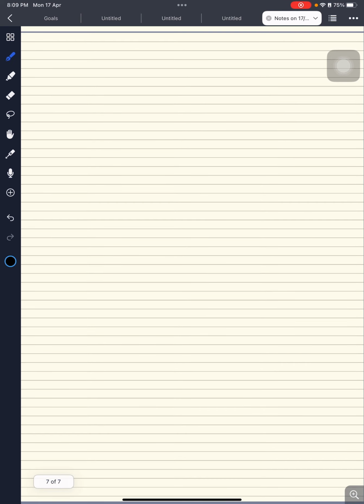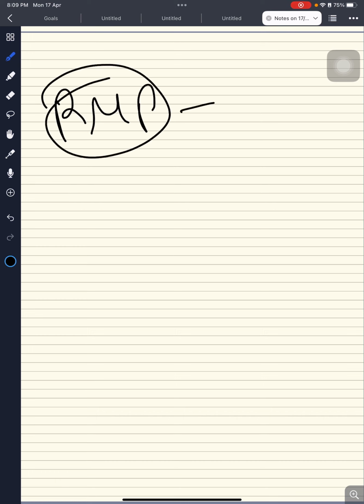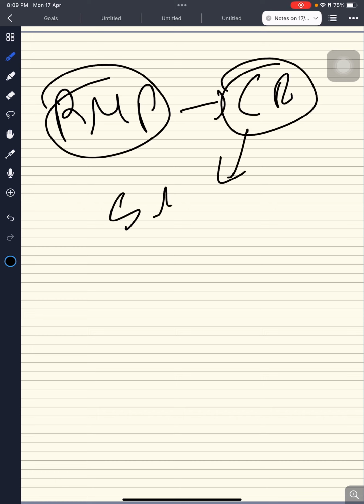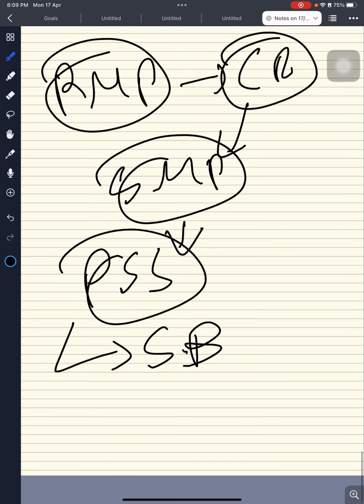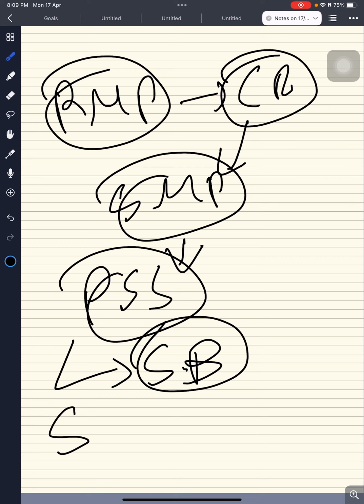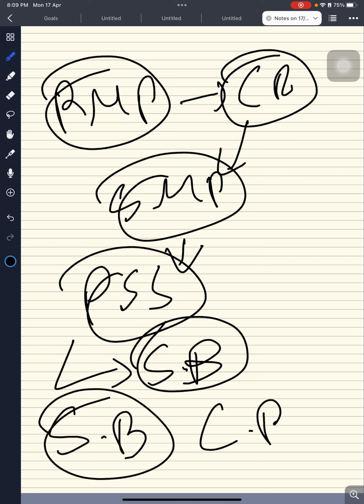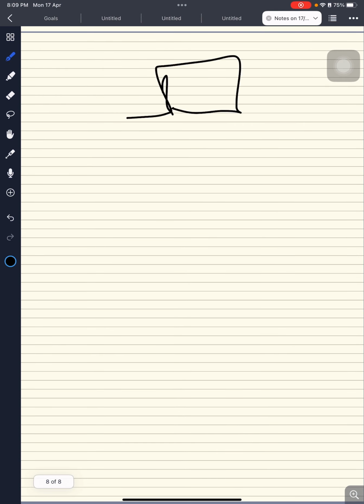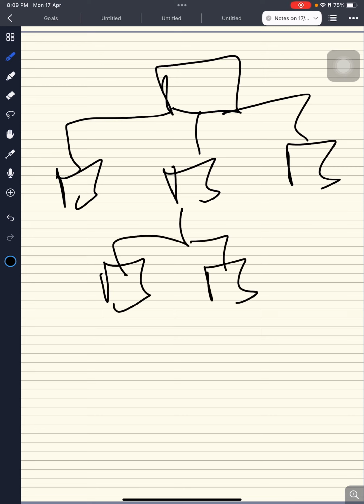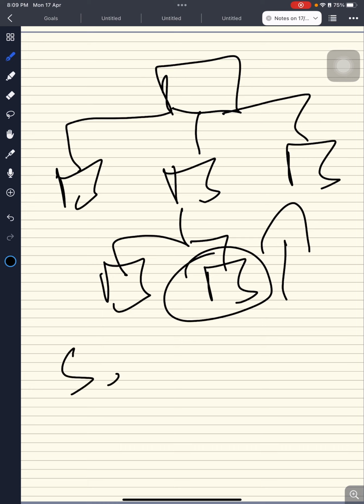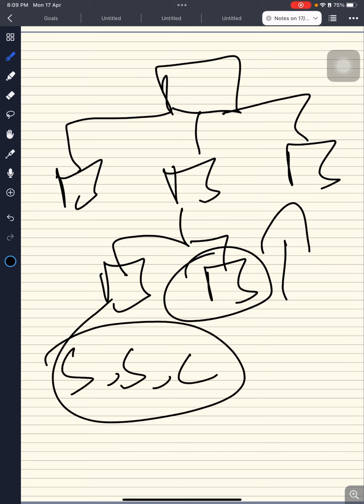Through the requirement management plan, we collect the requirements, and through the scope management plan, we clarify those requirements, and we make the project scope statement and then the scope baseline. Now this is the approved scope. Then we make the schedule baseline and then the cost baseline using the WBS that was made. There are many estimation techniques, but bottom up is the most accurate, and analogous estimation is the least accurate. Now we have the scope baseline, schedule baseline, cost baseline, all these plans.